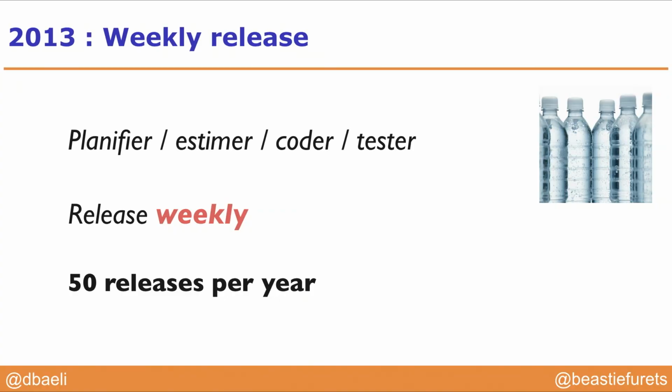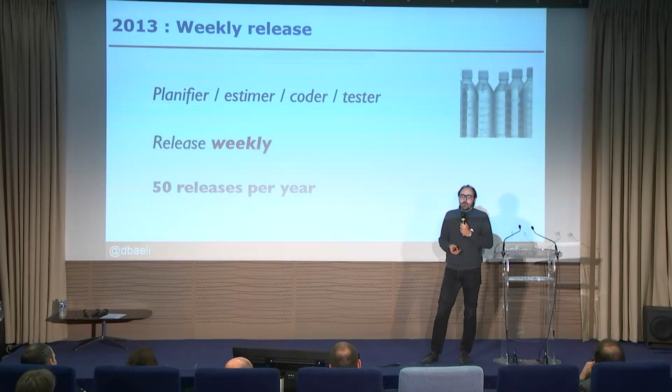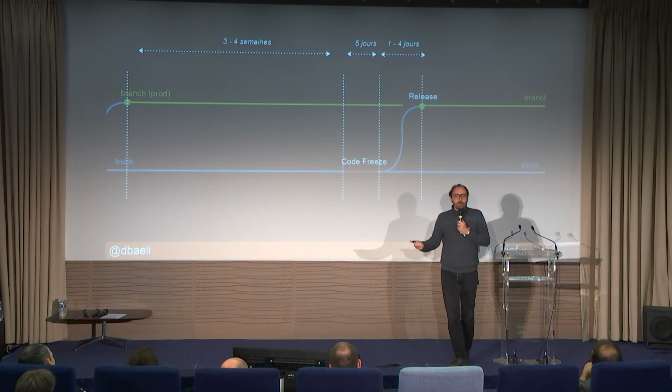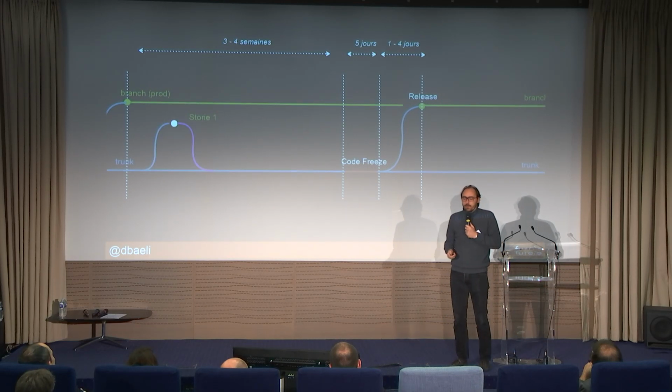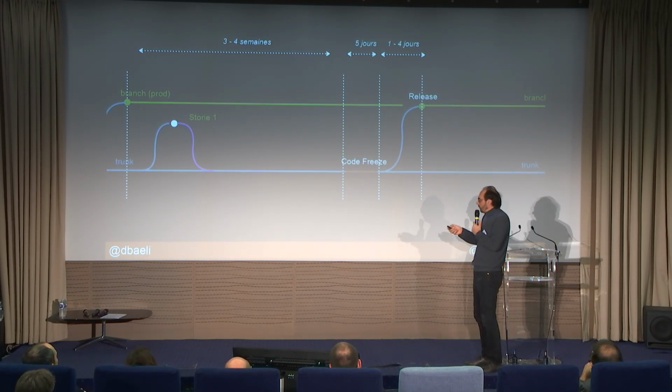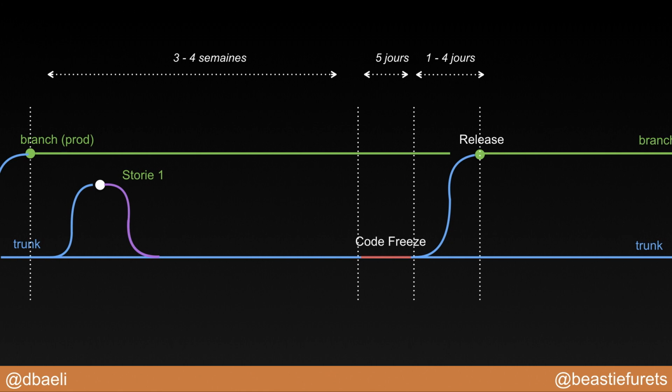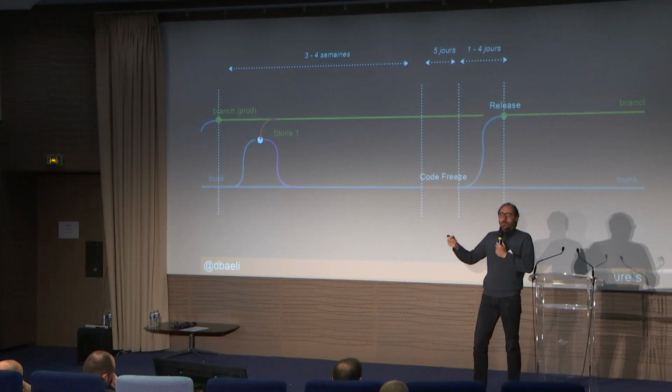And same kind of thing, a planning for a month, or we could have a planning for a week, but it was more a month. We kept the same organization, a monthly big release, and we decided to say that one change that is ready to go live, why can't it go live? What is blocking it to go live? Nothing. So we decided that we can replay the changes that have value. We can replay them on the production.